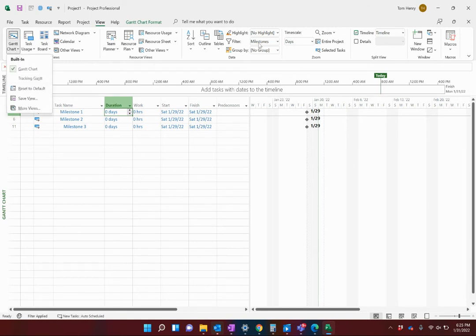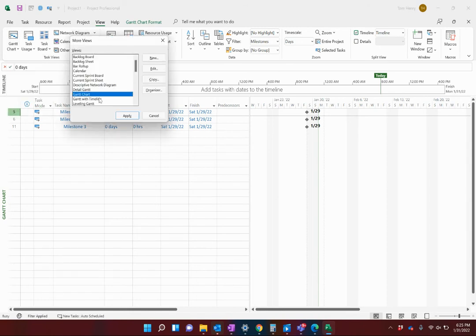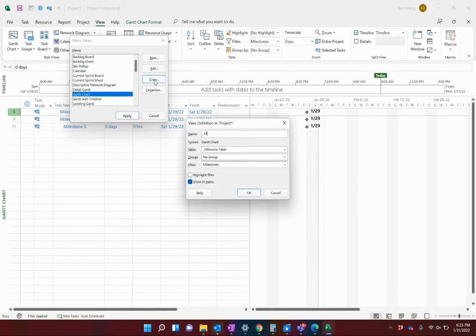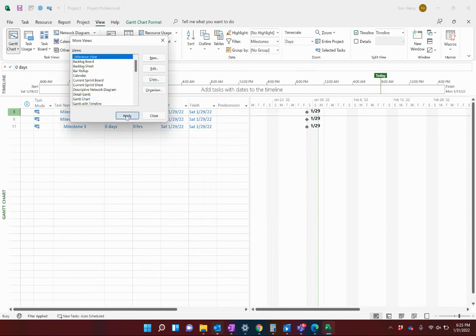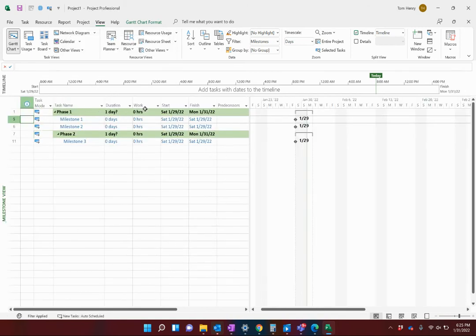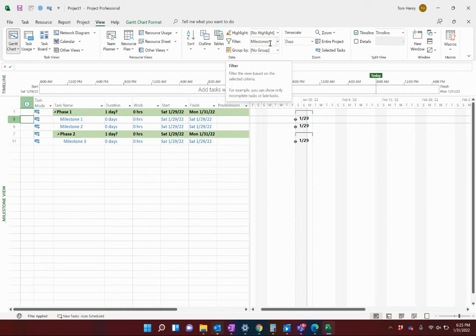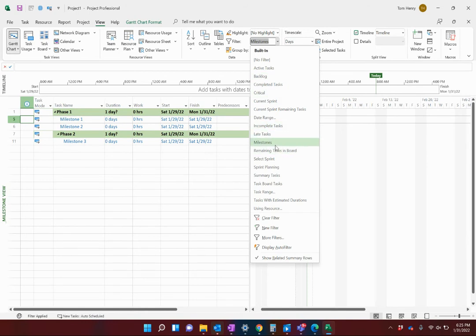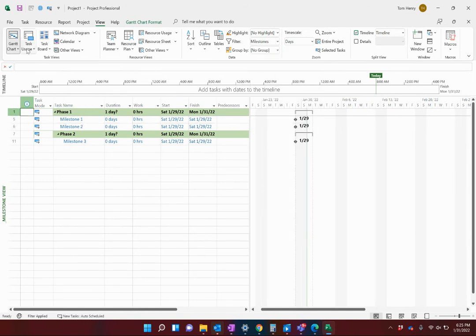The filter shown here is the Milestones filter. I click More Views — that's the way I do it rather than just saving the view. I've got Gantt Chart and I'm going to make a copy of it, calling it 'Underscore Milestone View.' Because I've applied that Milestone table it's already selected. The table is the selection of columns you have within the view. In the data section you can see those columns — that's the table. You can also set a milestone filter, different highlighting, and different group-bys.